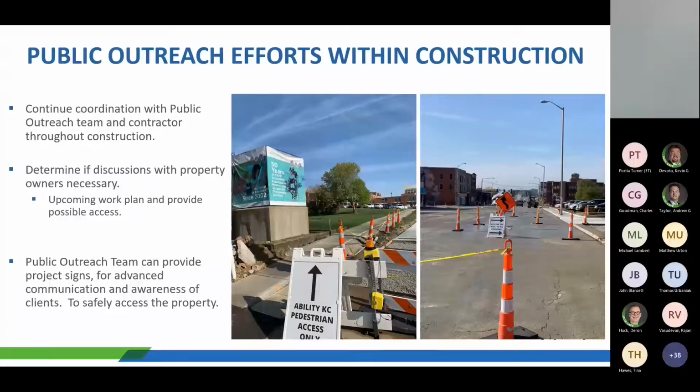Within construction, on-site meetings or calls can be very beneficial with the particular property owners. It provides them an opportunity to describe the work plan, or if they have any upcoming needs or specific access issues that we could help out with, and it provides a better understanding of what the prime contractor is doing and also their subcontractors.